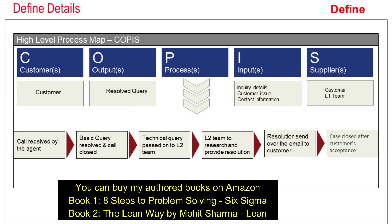The next thing the team did was create a high-level process map. Because there were cross-functional teams involved, everybody should be on the same page about the process. So a SIPOC was created. C stands for customer, O for output, P for process, I for input, and S for supplier. The supplier of information is the customer, and the inputs supplied are inquiry details, customer issue, or contact information of the customer, all provided by the L1 team to L2.